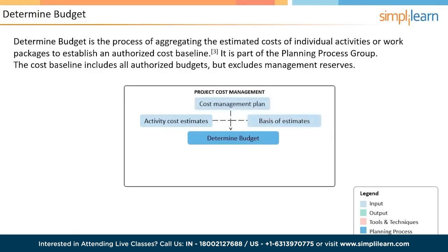The cost management plan lays the framework for the cost management processes in the project. It provides guidelines such as the budgeting cycle, tools and techniques used to prepare and approve the budget, etc. In addition to these two important inputs, scope baseline is also looked at. Project schedule provides aggregate cost in a particular calendar period to ensure how much money can be made available during that time.